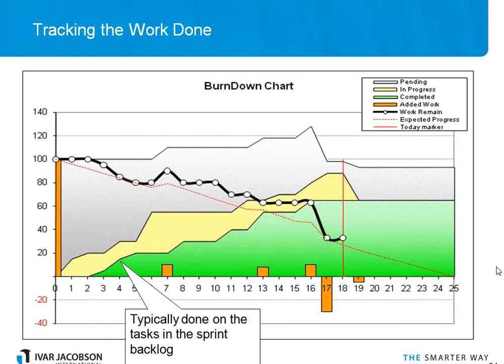The other thing that we're showing on here is, so the top grey shows the total amount that we're supposed to be doing. The green, growing green area, shows how much we have done, how much has been completed. The yellow shows what's in progress, and the red line shows that we are currently on day 18. So I've messed my graph up because I've taken some work out on 19, and we haven't got there yet, which I can only apologise for. But you can see where we are.